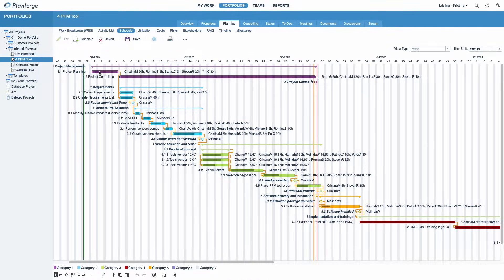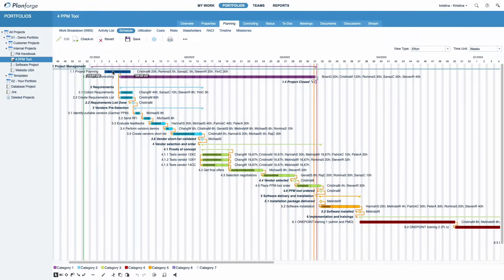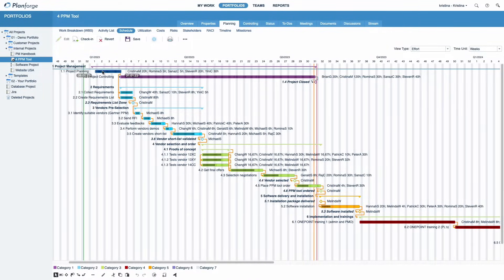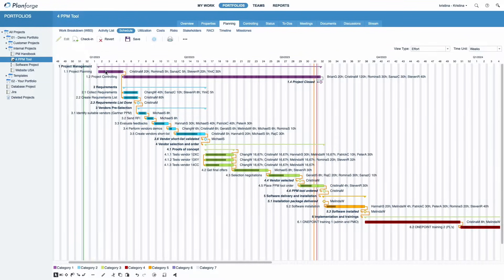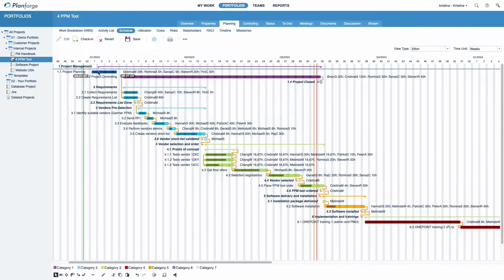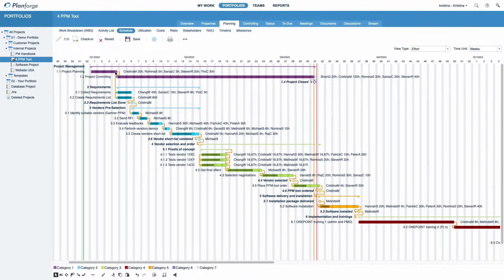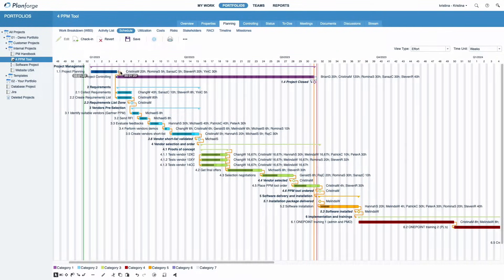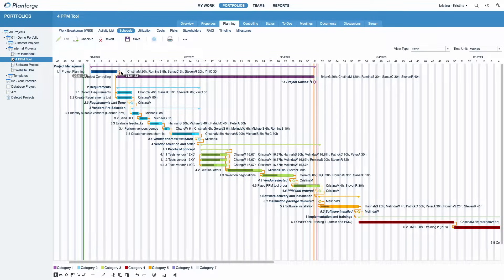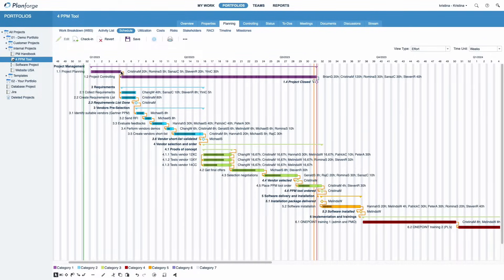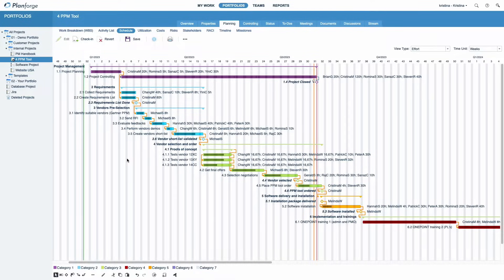You can now move activities in time and in your project structure by selecting and dragging an activity. If you start dragging close to the finish date of an activity, you can also easily adjust its duration. Note that the start and finish dates displayed are being updated in real-time as you drag.